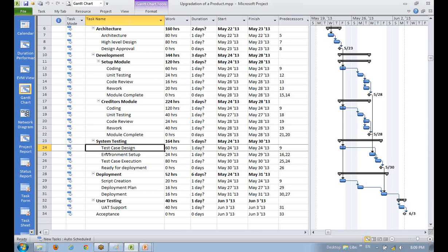So, to rephrase, I want to know where I can control those things. I don't want it to take it out of my control. So the thing is that it is telling you that these things are starting at the same time. Now you see, do you have resources to start this at the same time? If not, then make this resource dependent.